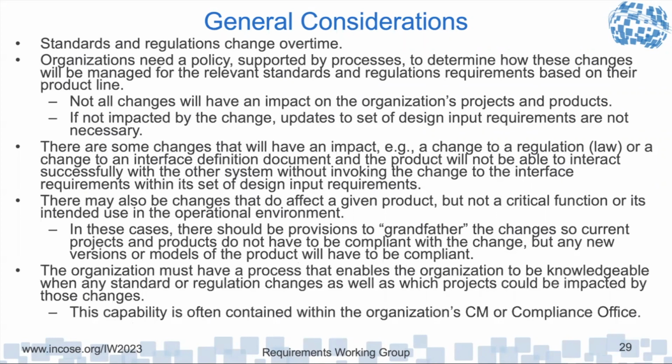So organizations must have processes that enable the organization to be knowledgeable of any standard regulation changes, as well as knowledge of which projects could be impacted by those changes. And usually this is something done in the configuration management or compliance office. I've taught classes for organizations that said they weren't aware of any organizational group that was keeping track of changes and weren't being notified whether the standard or regulation that's applicable to their project has been changed.